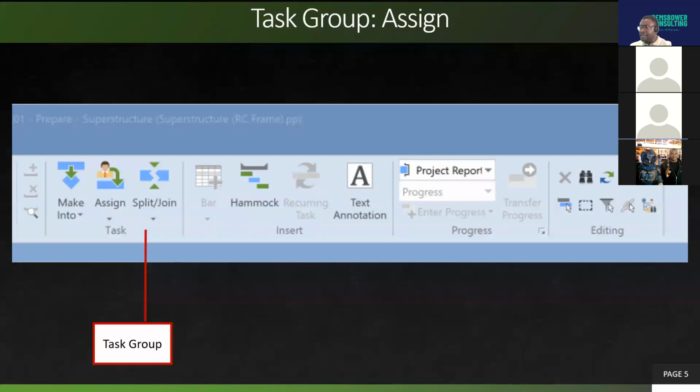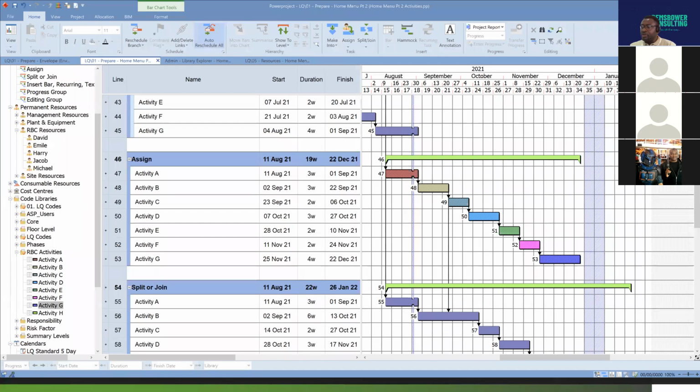Now, a calendar is a named record of dates that defines when working or non-working times take place. Okay, so it's important that that is configured in your program. You assign calendars to tasks and resources within projects to define the time during which they are available for working.